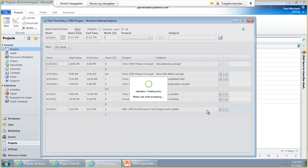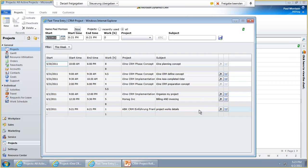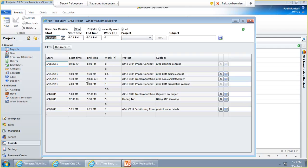You're able to choose how far in the past you can modify the time entries. This can be chosen for each customer in the settings of CRM Project. And as soon as one of these time entries is connected to a Fast Time Sheet by the billing, then it cannot be any longer modified because it already has been checked by the project manager and is considered for billing.